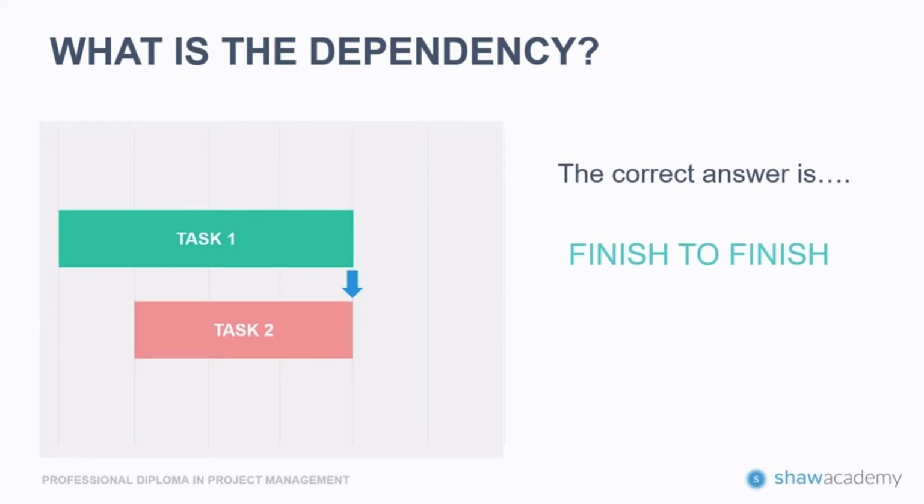These tasks can begin at different times as long as they finish together. You could begin designing your website while someone is doing the copywriting, but you will need both of them to be finished at the same time. Another example would be serving a waffle. You need the waffle to be cooked, but you also need the ice cream to be cold, and you need to quickly put them together at the end.